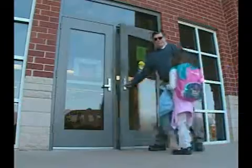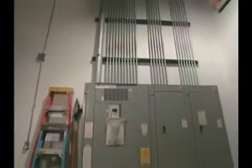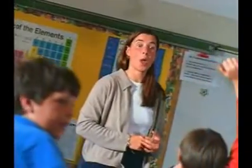There's a summer sprint that happens, for example, when a school district or a school can be taken apart and has to be put back together because the kids are coming. IFS arrives on site, wired and pre-tested, which eliminates errors and saves time and money. The IFS helps with reduced installation time because the equipment shows up already internally wired, so the contractor just has to set it in place and make the final connections. The biggest thing is just savings in labor. And that translates into savings in dollars, which can be reallocated to bettering the educational experience.